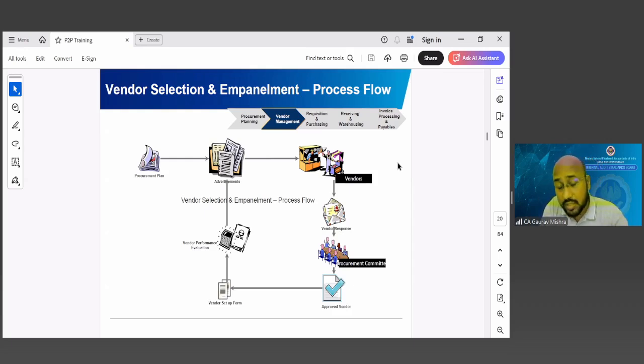The second risk could be that in the RFQ you have prepared, you have not kept the content clear: inadequate preparation of the RFQ. Scope of work or scope of quantity, whatever the case may be, is not clear. Payment terms are not clear. Packaging terms are not clear. Delivery terms are not clear. These are a few of the risks which we understand in the advertisement process.